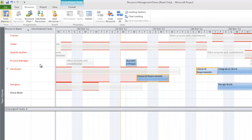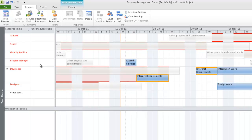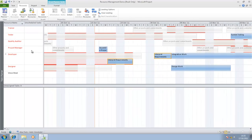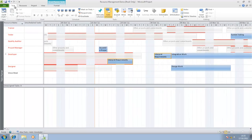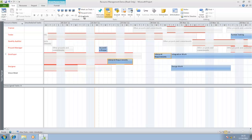If you notice, everything juggled around when I did that because it still takes into account dependencies. Let's say Vince is now on sick leave—I would click and drag into somebody else's diary. When I file, save, and publish this, that work would be pushed out to whoever the work's been reassigned to.